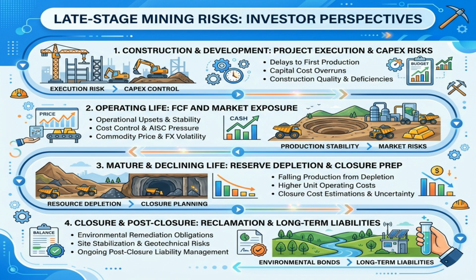Late-stage mining risks are often underestimated by investors. During construction, the biggest threats are delays, capital cost overruns, and quality issues. During the operating life, the mine faces cost pressure, operational disruptions, and exposure to commodity prices and foreign exchange. As the mine matures, reserve depletion, falling production, and uncertainty around closure costs become more important. After closure, long-term environmental and legal liabilities can remain. The key lesson is that risk continues throughout the life of a mine. Production reduces geological uncertainty, but it introduces a new set of financial and operational challenges.